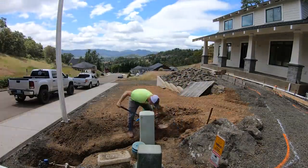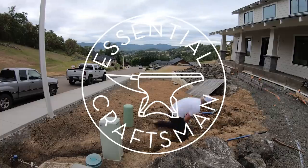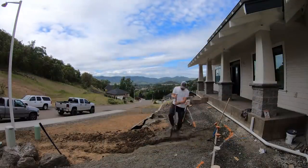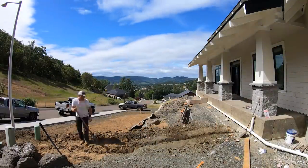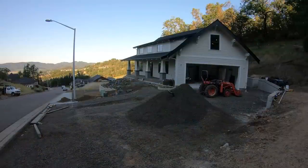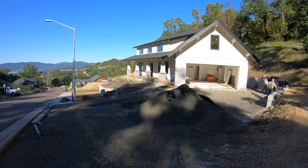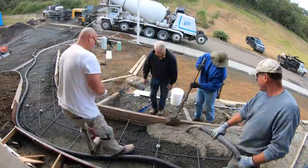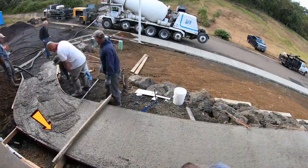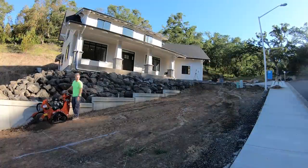Now, just like any other part of any other construction project, you really better start your landscaping with a pretty clear plan in mind. Our landscaping plan was put together way back before we poured the concrete driveway and sidewalks, because the sidewalks are a key part of the landscaping design to begin with, and because we wanted to make sure that we put sleeves, chases, underneath the sidewalks in every place where sprinkler pipes or control wires might need to run.